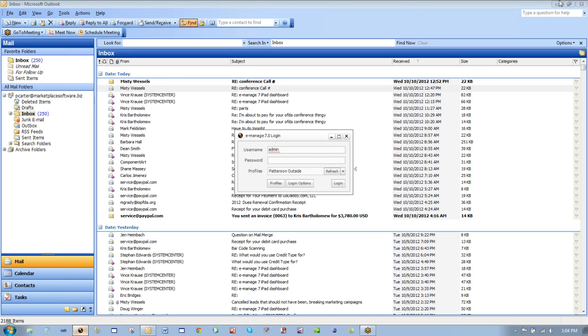And then we can give you income and expense, basically a profit and loss by phase of the project, so that you see a pretty accurate representation of how much you sold something for and how much it cost you, like to do chipping or demo, to do the plumbing and electrical, stuff like that. So, does that make sense? Yeah, it does. All right.